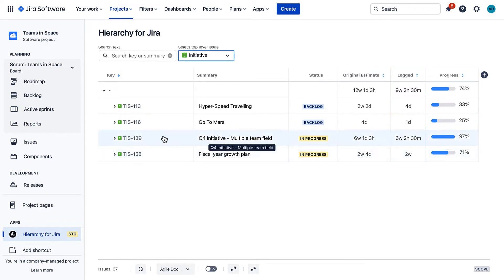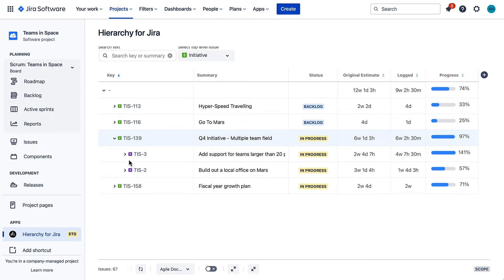If your team's work hours exceed the original estimate, the app will also report the total time overspent on the issue.